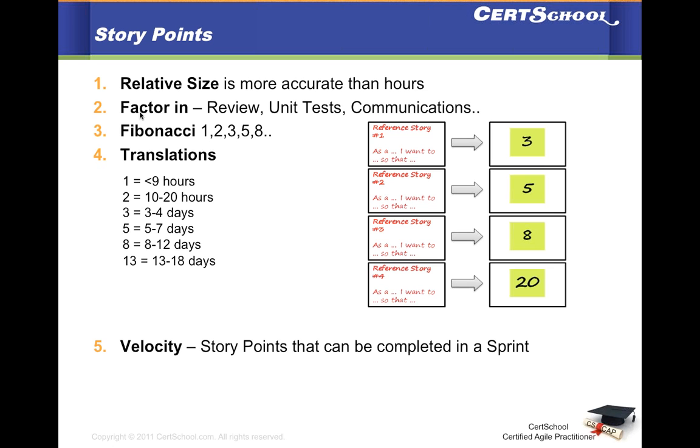We factor in time for doing integration testing of the deliverable produced, but we may not factor in time for unit test case writing. There is a whole big list of things that we usually don't factor in. Code coverage, how much code coverage there was, that analysis.